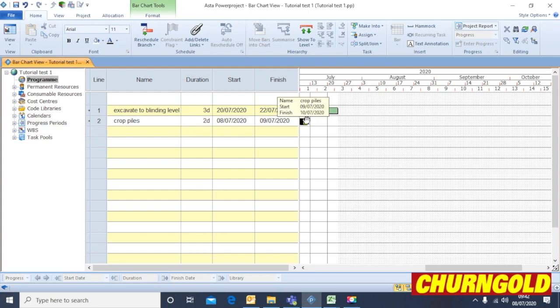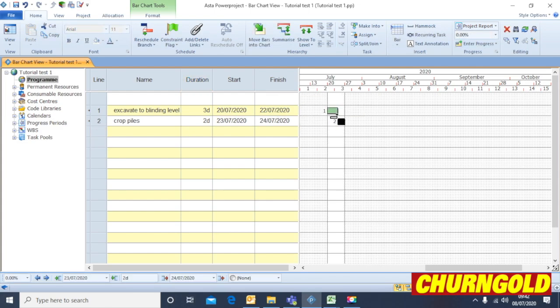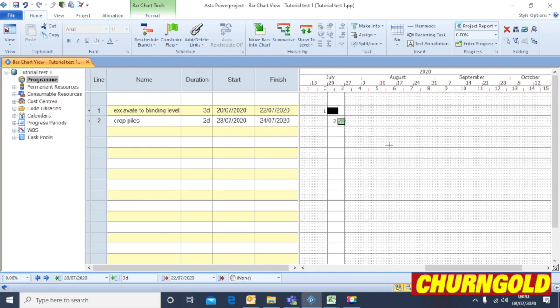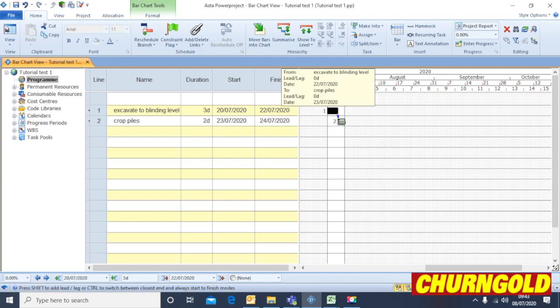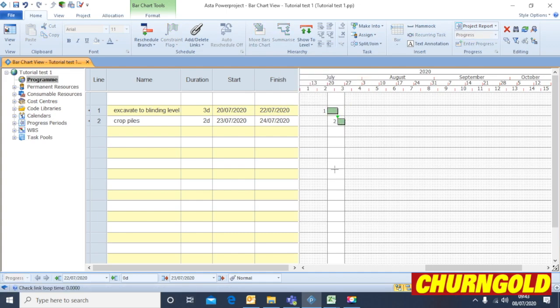You can drag these tasks along and then add a link. So in order to link two tasks that can't be running at the same time, they have to follow each other. You click the detail end of the first bar and just drag it down to the other. And then you can keep adding tasks.